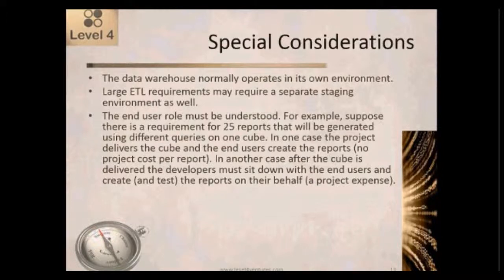They're going to be generated using different queries, but on one cube. In one case, the project delivers the cube, and the end users create the reports. In that situation, we have the cost of the cube, but there's no project cost per report. The end users do that, and whether they take a week to do it or 10 years, it doesn't matter to us.